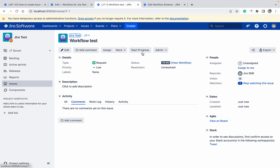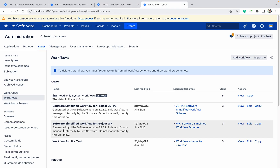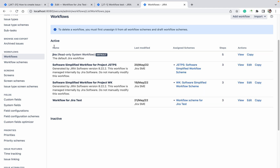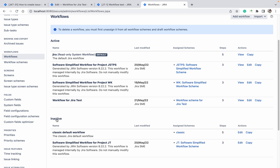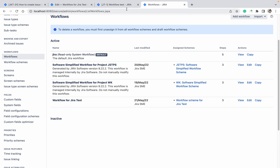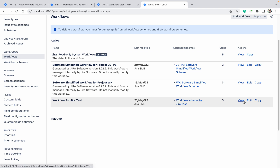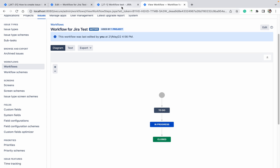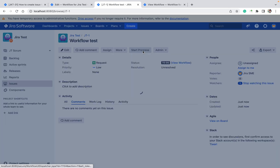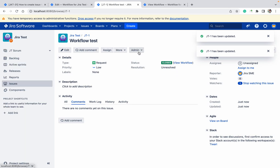After creating the ticket, I can see only 'Start' — I cannot go to Closed directly because in my transition only Start Progress is defined. You can see there are two workflows: one active and one inactive. Active means it's used by a project; inactive means it's not used by any project. The inactive ones are from deleted or archived projects. Viewing the workflow, you can only go from To Do to In Progress, then In Progress to Closed.